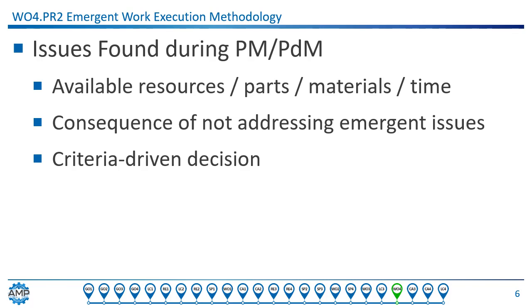These are generally the condition-based tasks that we're trying to design the maintenance program around, and we develop those tasks in terms of quantitative data or observations that serve as a go or no-go indicator for continued operation of a part. So every task we develop must recognize what is to be done when a failure indication is found. It is best if the work instructions state in clear terms to do a repair or to write a corrective work order for later execution. This decision is risk-based and linked to the consequences of allowing failure to continue within the P to F curve while work is planned and scheduled.